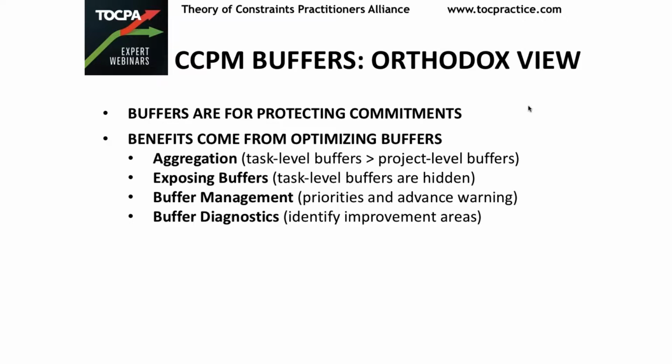The second part, which has been brought forth by some people, is exposing buffers. You make the buffers visible, and when those buffers are visible, they are less likely to be wasted through, again, behavioral issues like student syndrome, error reporting, Parkinson's law.